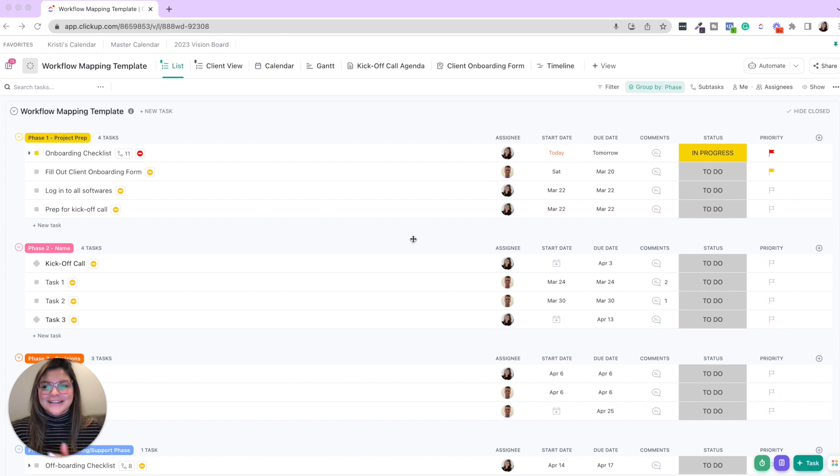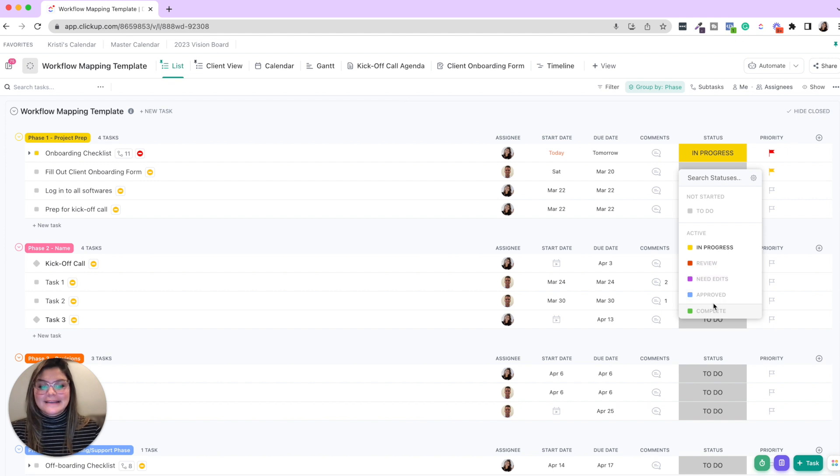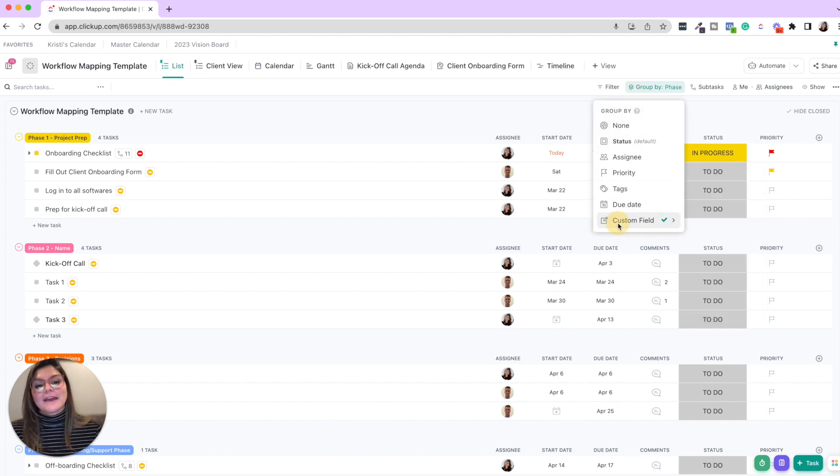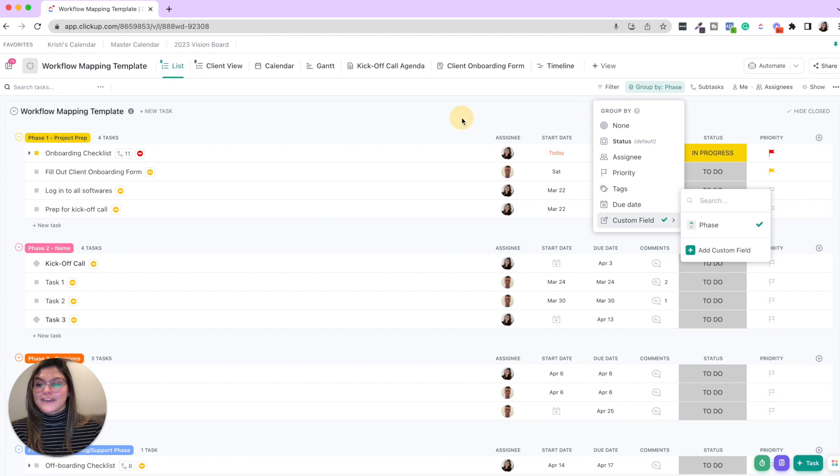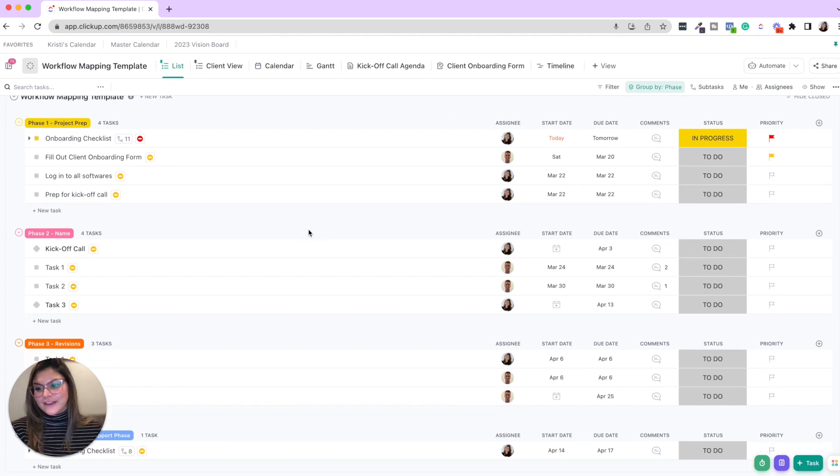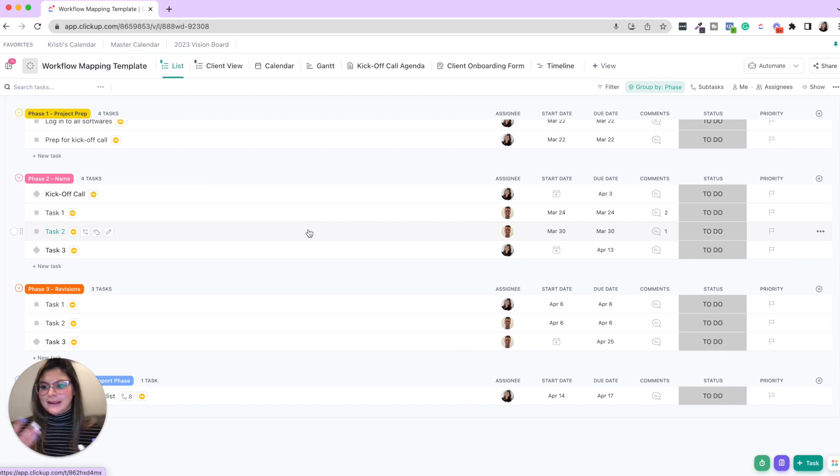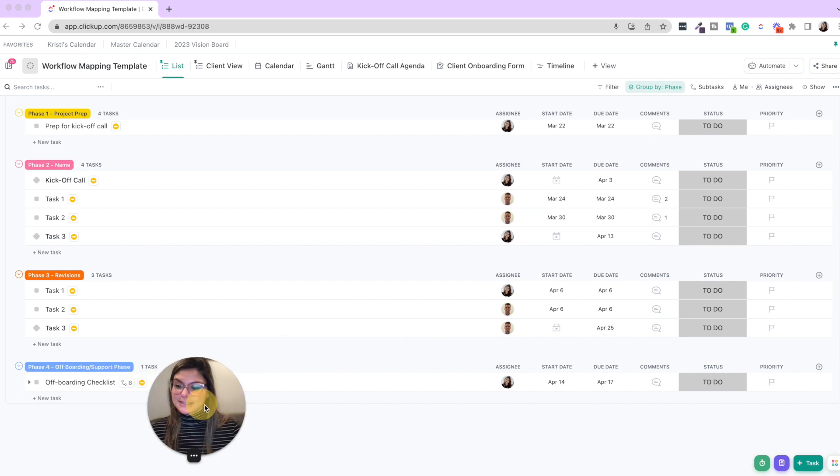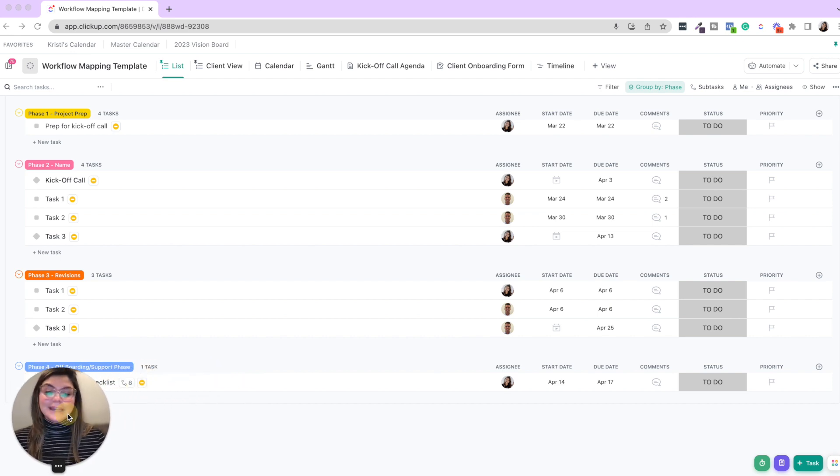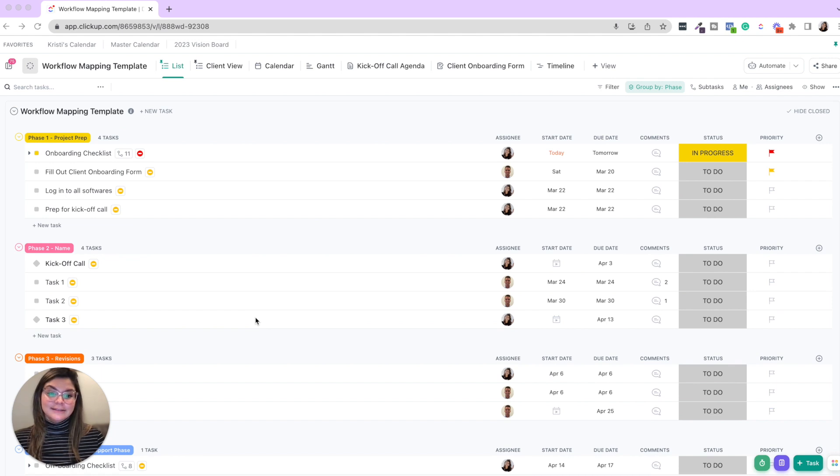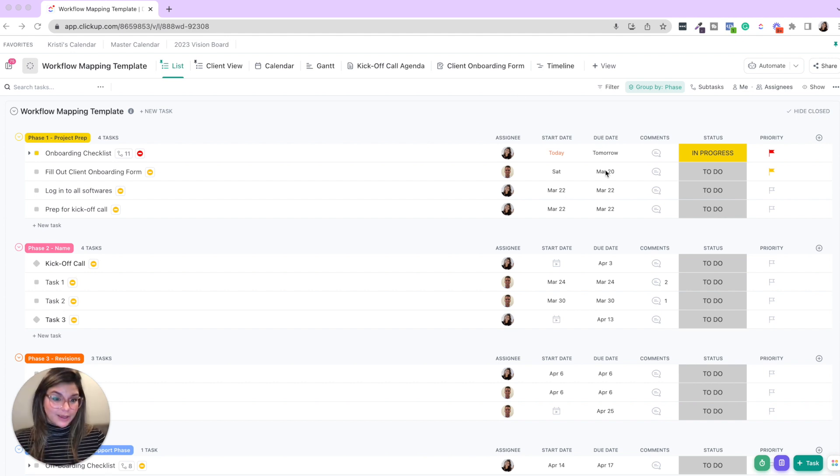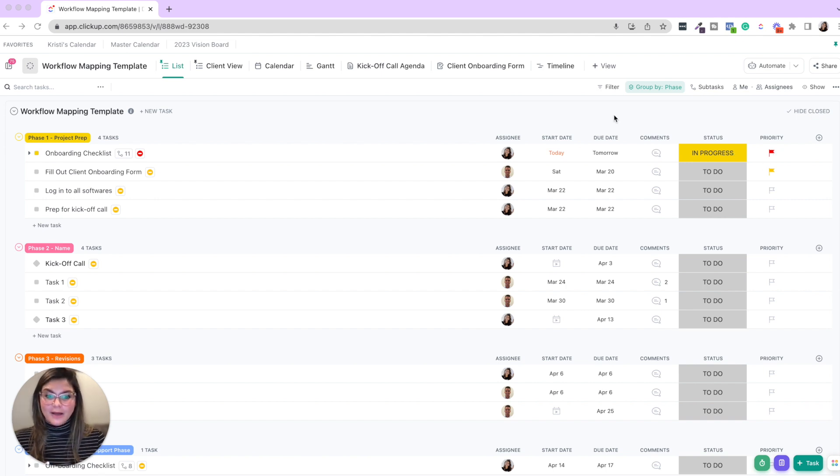Here's the workflow mapping template. You can see the different tasks instead of naturally being grouped by statuses, they're instead grouped by this custom field called phase. So we have phase one project prep, phase two implementation design, phase three revisions, and then phase four offboarding and support.